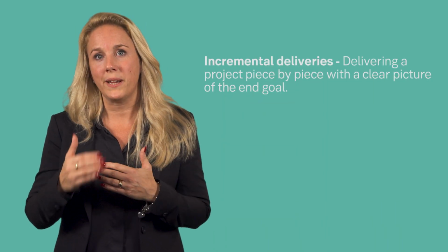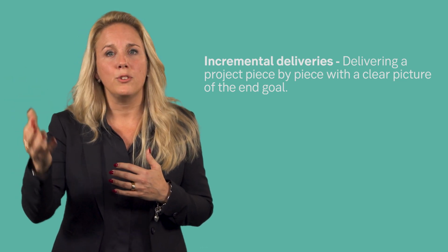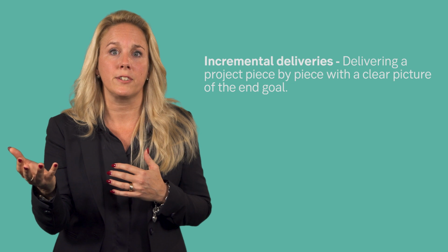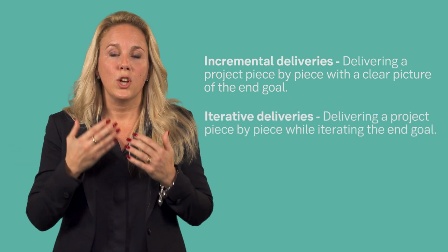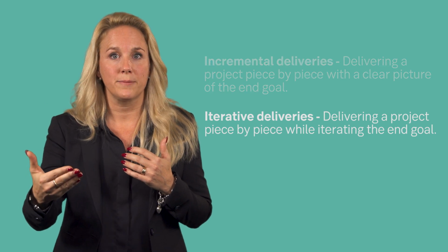Incremental means that you do piece-by-piece deliveries, and you have a predestinated goal, and you never look back at what you actually delivered. In the iterative process, you continuously improve what you delivered after you've had learnings.